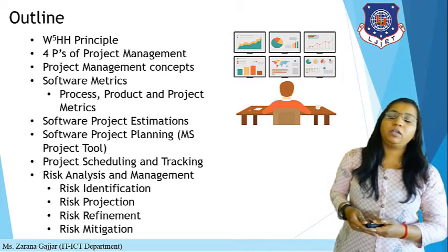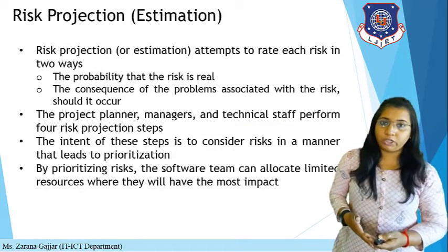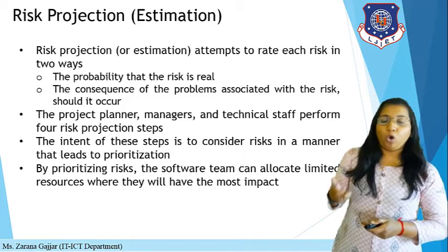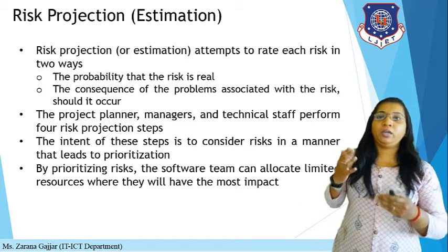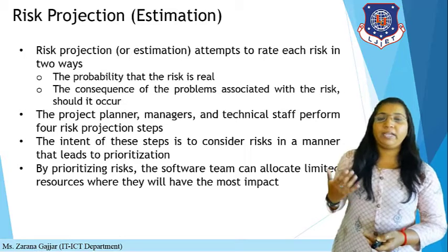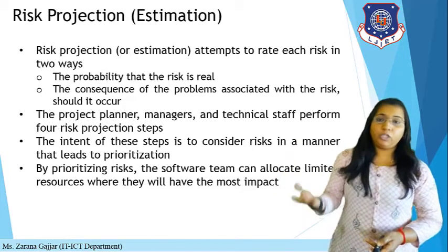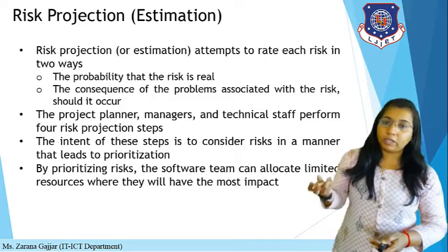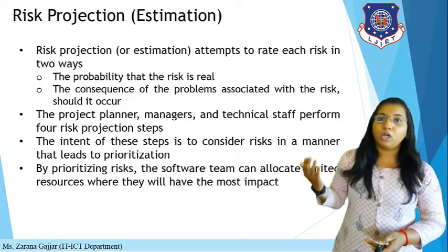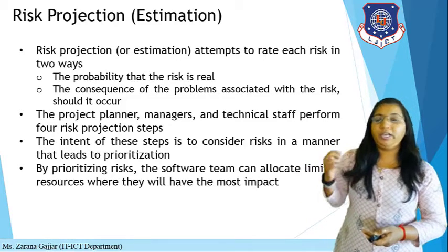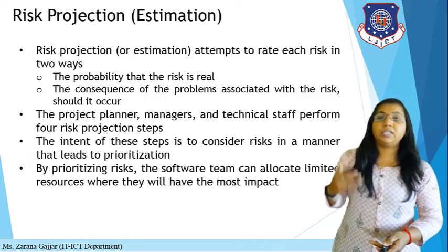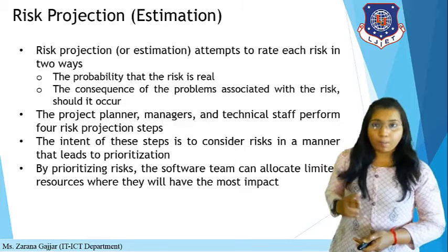So let's start with the first topic, that is risk projection. Risk projection attempts to rate each risk in two ways. The first way is the probability that the risk is real. So what is the probability that the particular risk is real or not? And the second way is the consequences of the problems associated with the risk should it occur. These are the two ways for risk projection.